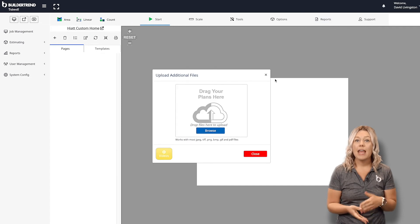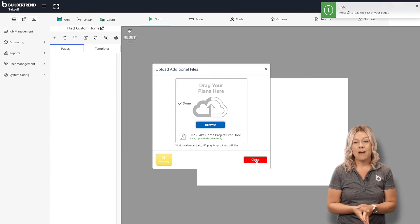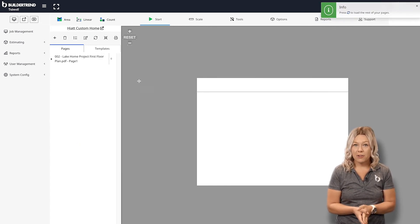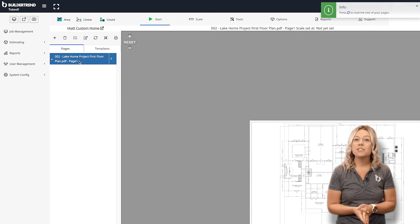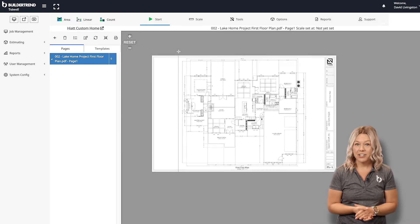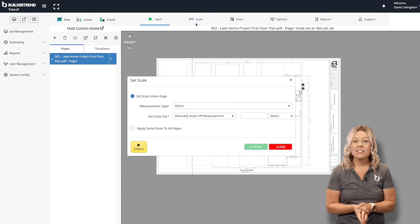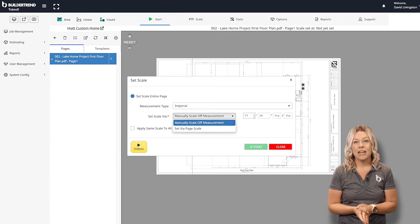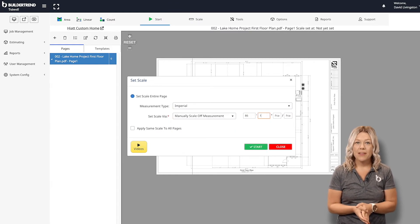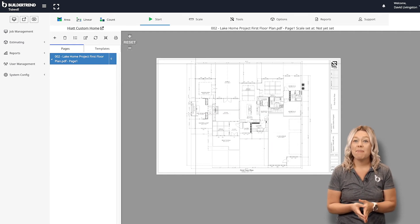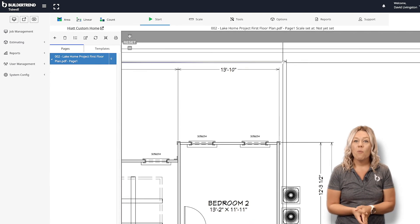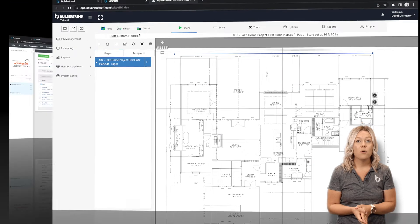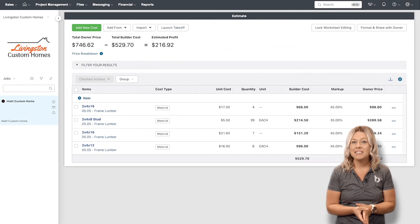You can upload a PDF or image file from your computer. Once your blueprints are uploaded, it's time to start measuring. Set your scale using the page scale or manually set it using a known dimension. You'll use the built-in estimating engine to make your measurements. While measuring, your cost items will automatically sync to your Buildertrend estimate in real time.